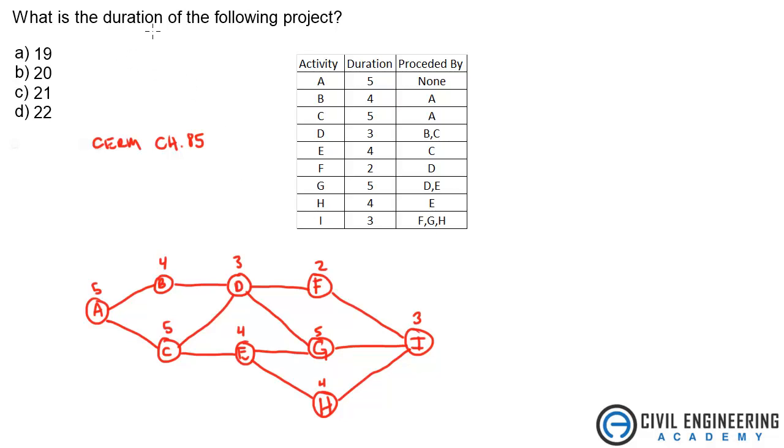Okay, so when it's asking for the duration of the project, they're asking for the critical path. Because that is the longest path that it takes, which is going to be the duration of the project. So it's just a tricky way of doing that. So let's look at all these different routes and see which one adds up to take the longest.